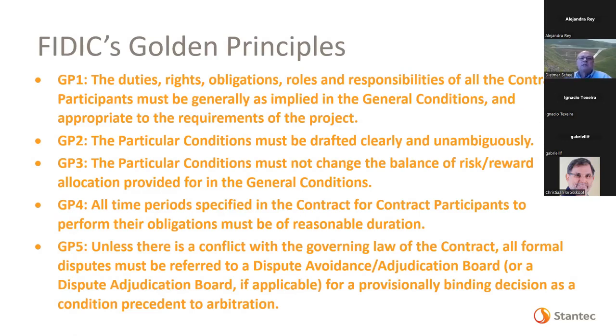Particular conditions must be drafted clearly and unambiguously. That's pretty much true of any contract. Number 3, particular conditions must not change the balance of risk reward allocation provided for in the general conditions. The exception in a powerhouse rehabilitation project is risk assessments and that sort of thing. But that's not a major, that's not a cardinal change to the Yellow Book.